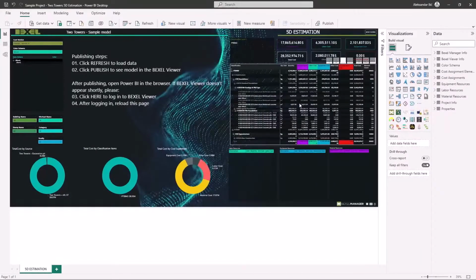On the other hand, for specific users, for specific project needs, you would sometimes need to customize these reports. So in tendering phase, the tendering team was able to integrate standardized cost classification with specified cost breakdown by material, labor, equipment, and other cost supplements. So that means they didn't specify exact resource for every cost item, but they specified which percentage of that cost item is dedicated to one of these four supplements.